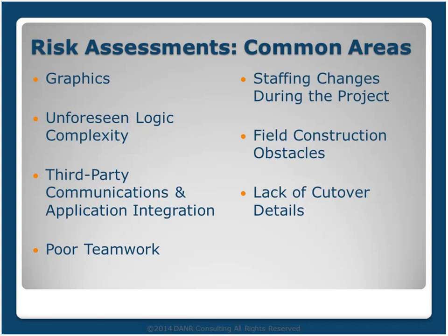But when you create your staffing plan or start to put together staffing plans during the FEL, you can look at how to manage the team so that more than one individual is involved in the work. And by doing that, you have someone else that's familiar with the project, and you're not relying on a single person. Now, obviously, there are resource limitations in every organization, so some of the time, these kinds of scenarios just aren't realistic. But thinking about these types of things during the FEL phase can really benefit you.